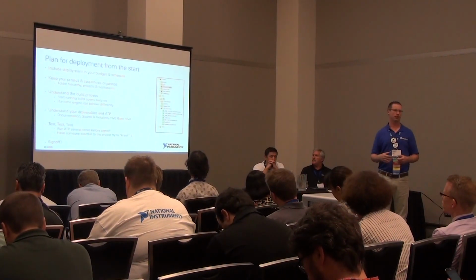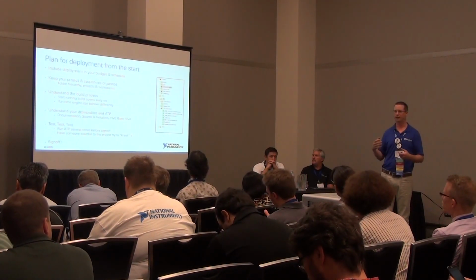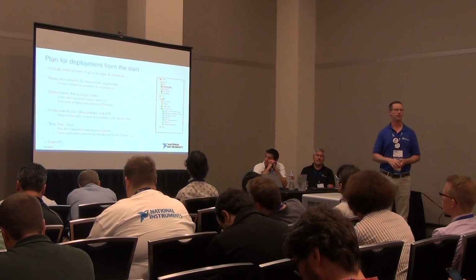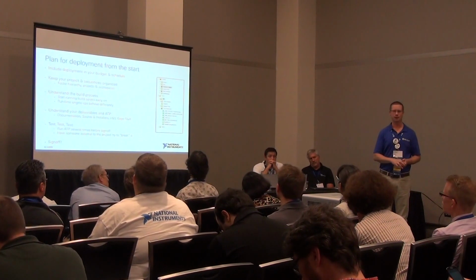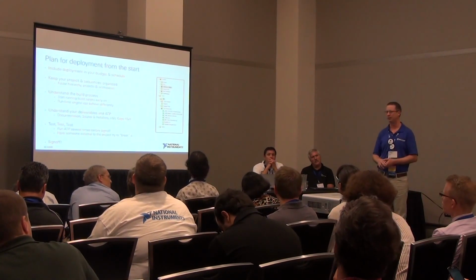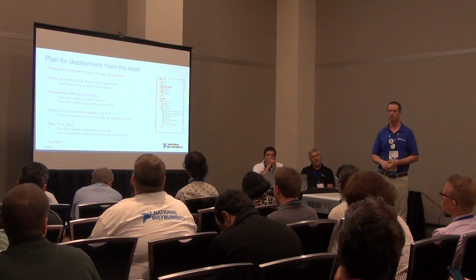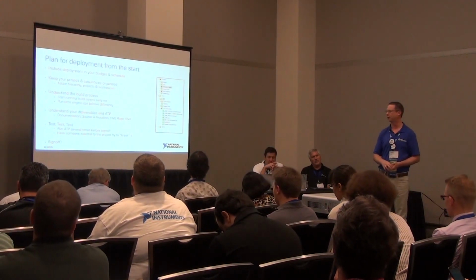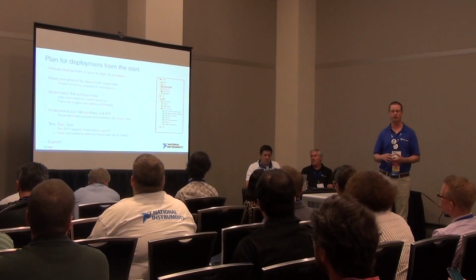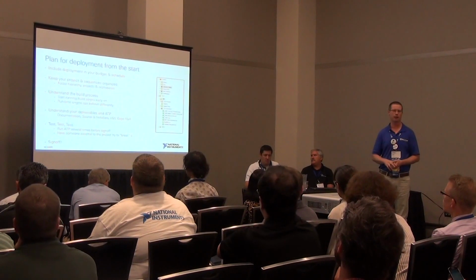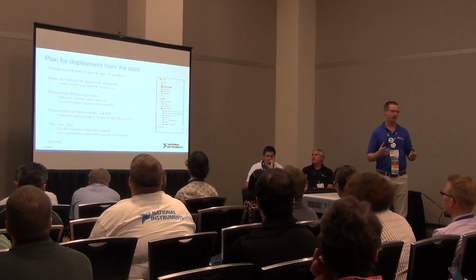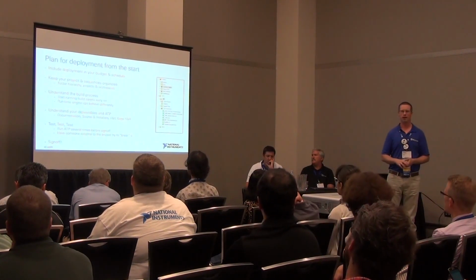Understanding what your deliverables are. Different industries, different customers, different departments have different requirements. If you're deploying this into an FDA environment, you may have months of validation testing, whereas if this is a low volume consumer product, it may be a quick, easy ATP. You run through, make sure you can get some passes and do some fault insertion, and everyone's happy. So understanding what those requirements are in terms of deployment and software, hardware, and documentation deliverables is really important from the start.